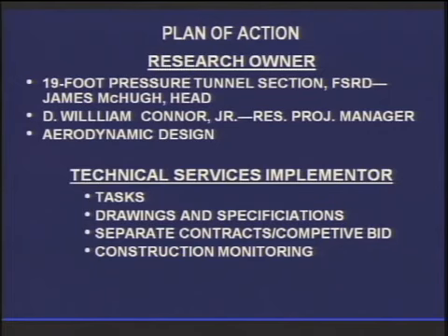For some of the other stuff, they would actually design what was needed, and they would sometimes give the contractor a set of drawings and ask, hey, what do you charge me to build this? So there's a lot of in-house design. There'd be a separate contract for each one of these things, put out for competitive bid, and technical services would take care of monitoring the construction with the research people looking over their shoulder.